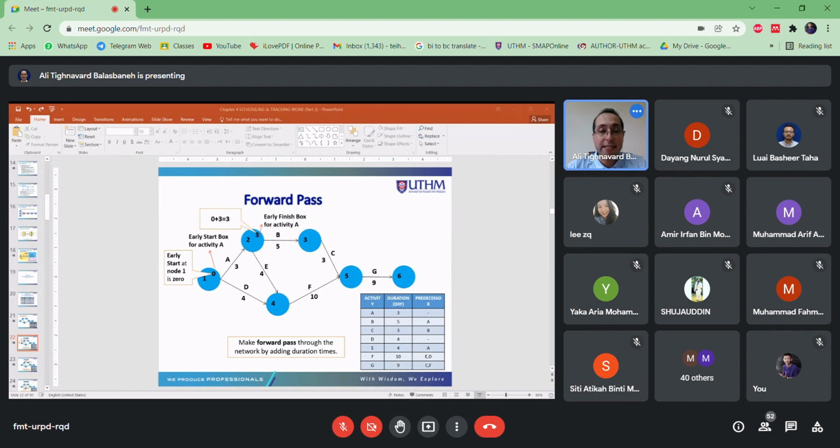This box, what is mentioned here is very important. If 2 or more activities end up at a junction node, just like number 4 and number 5. Take a look, number 4, 2 activities, D and E, end up at 1 node. You need to place the larger sum at ES, or earliest start. This is the earliest start, right?